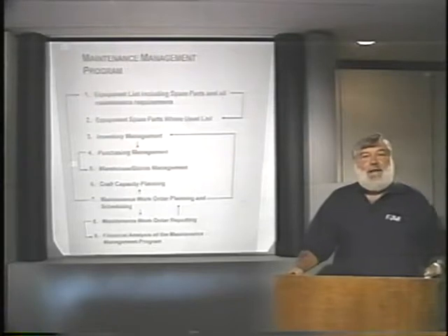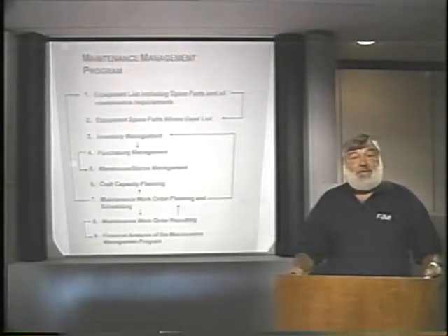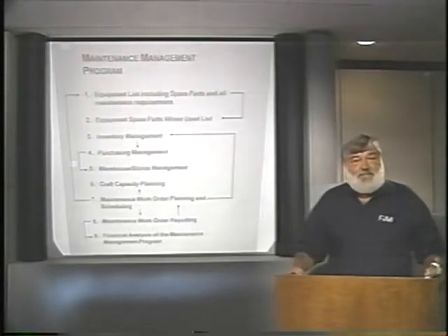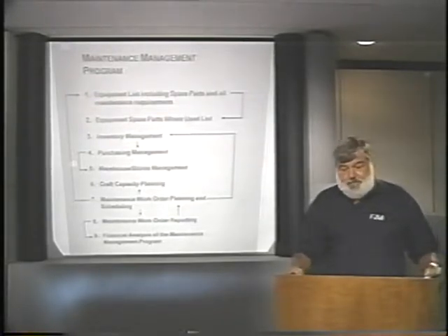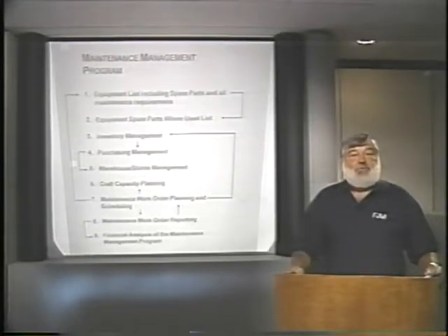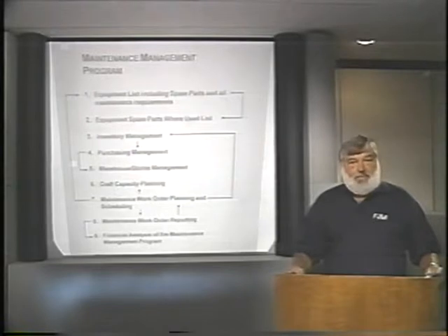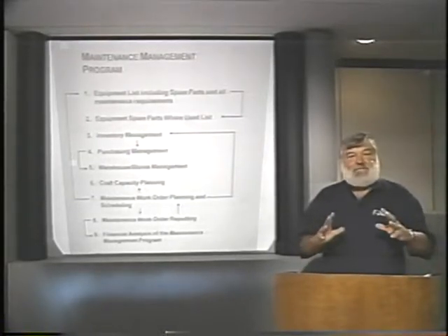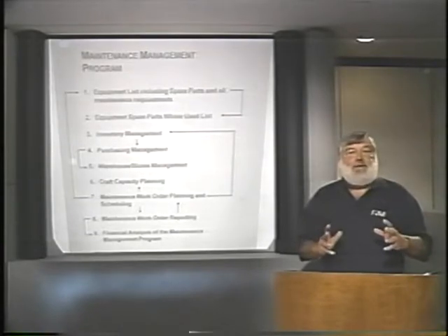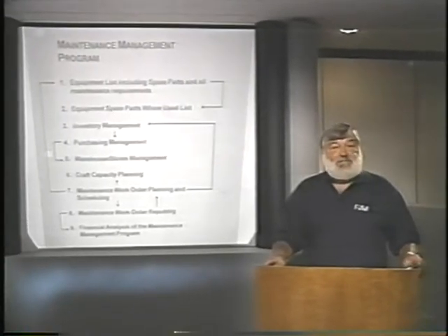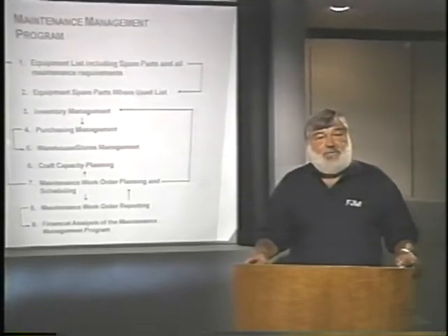There is another arrow coming out of 7 on the right-hand side, and it is going up to the inventory management section, and that is the spare part requirements for the specific PM work order. The arrow from 7 going directly up to capacity planning in the center of the page is representing the labor requirements. So what we have basically done here is we've totally integrated the planning and scheduling activity, addressing the asset, the spare parts, and what PM activity is required.